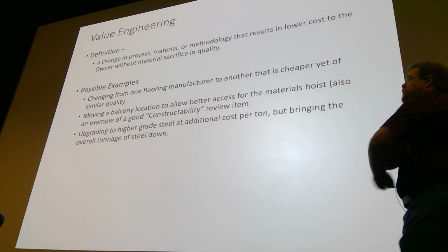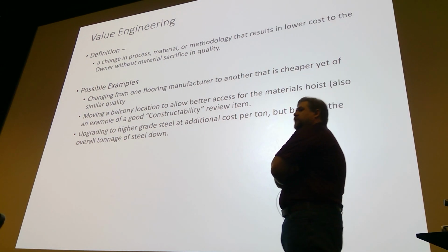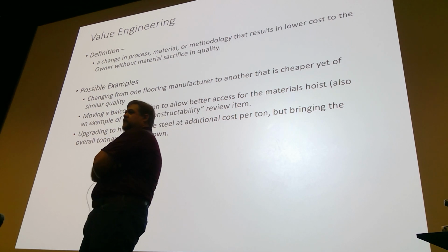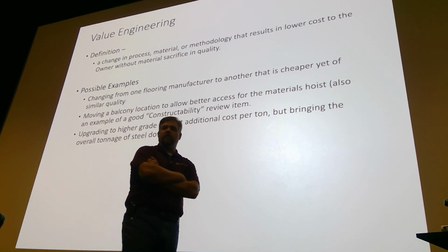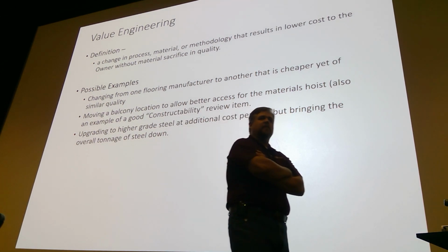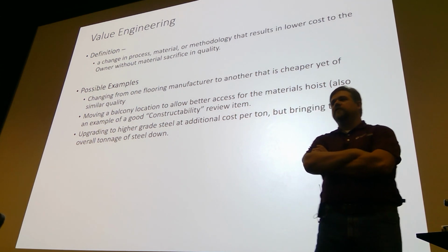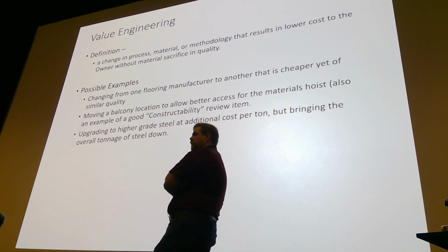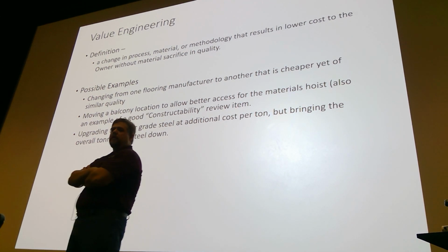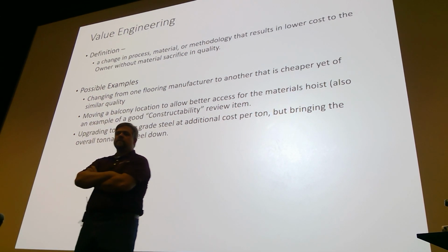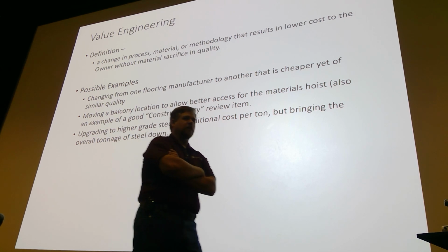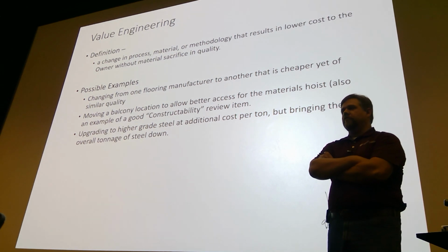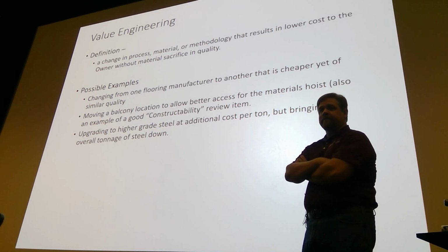Talk then about value engineering. And I drew a distinction in value engineering between what I term product equity. And I said that there's appropriate times for both, but most of the time when we're talking value engineering, we're really looking for something that does not have a material impact on the quality or ability or the use of the building. Okay? That's what an owner really wants. They want to know how to do the same thing cheaper, not how to do less cheaper. Less cheaper is easy.